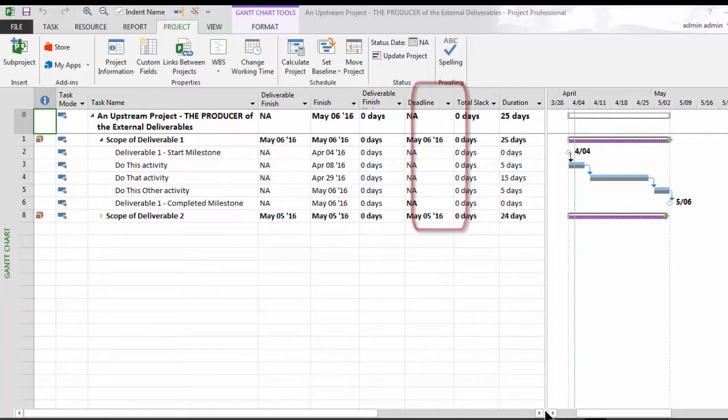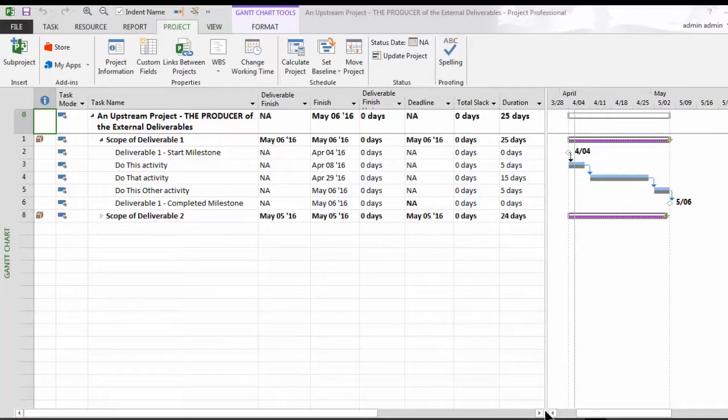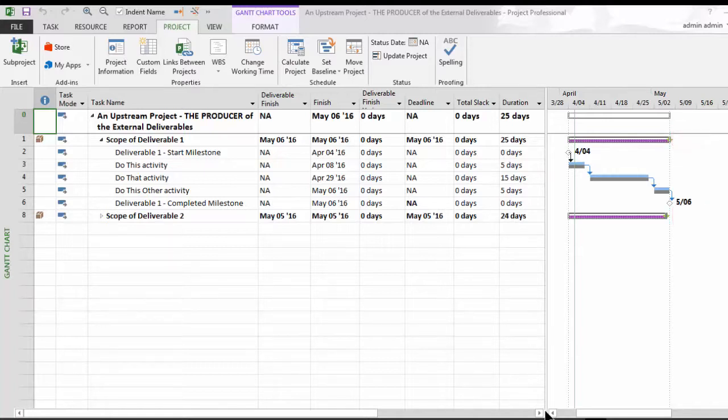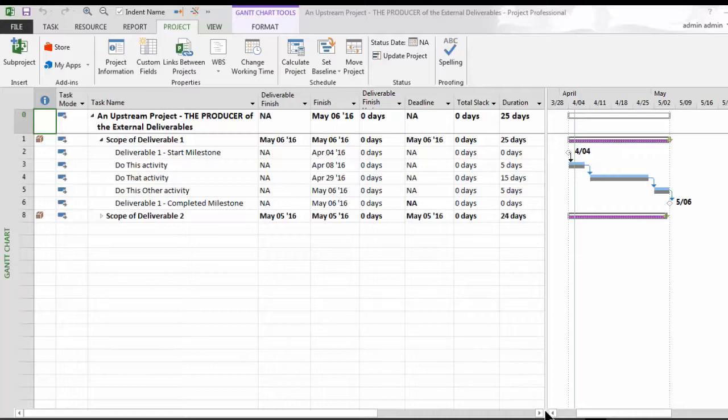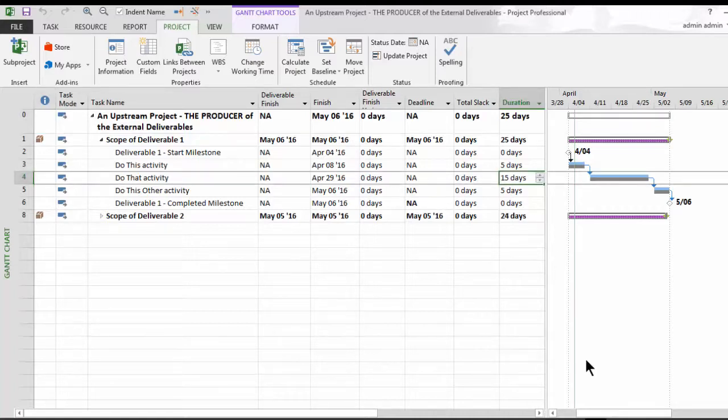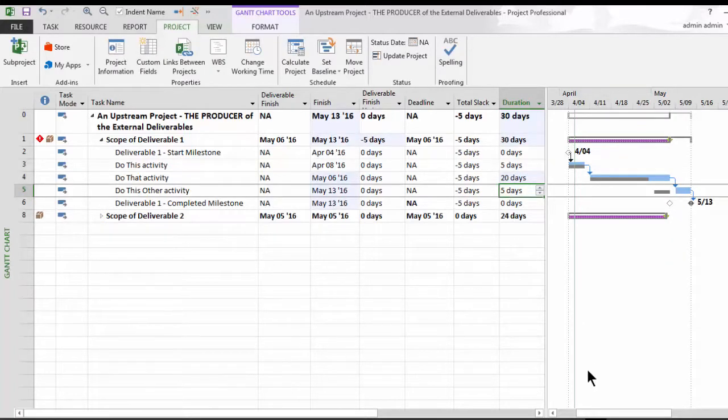They are also represented graphically on the Gantt portion on the right side of our view by a green down arrow. Having this information will indicate if I have exceeded my deadlines and by how much. Exceeding deadlines will put a negative duration in the total slack column. This will highlight how much time is needed to be trimmed or that we need to shave off in order to realign our schedule within our sponsor's expectation and our commitments. The total slack of a project rolls up so that you can monitor the status of the critical path quite easily. In fact, adding this field to the project's interviews in PWA will make tracking a project, a program or a portfolio's deadlines literally a cinch, allowing the PMO at a glance to see who is having difficulty meeting their deadlines and jeopardizing the critical path. Now, wouldn't that be something? Allow me to simulate a change here by replacing the 15 days duration with 20 so you can observe the values that have been changed, which are highlighted by Microsoft Project Pro.